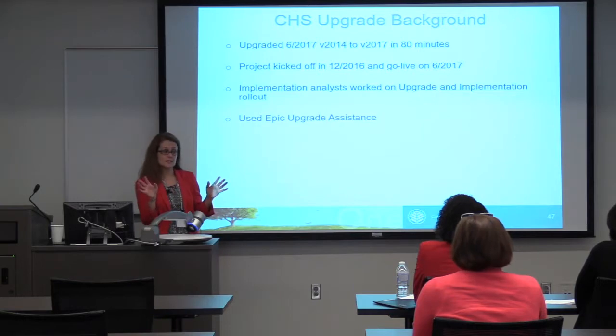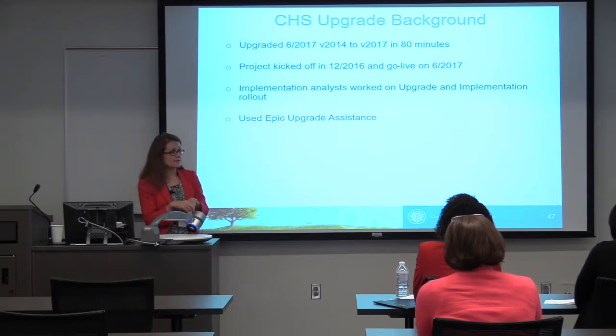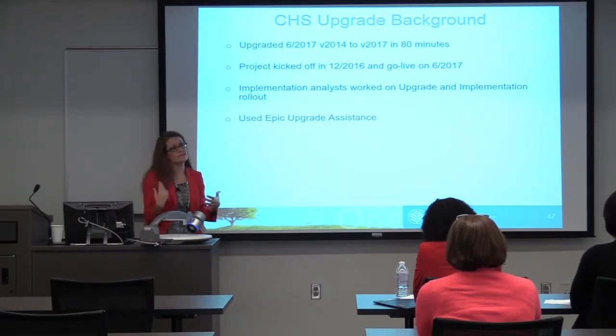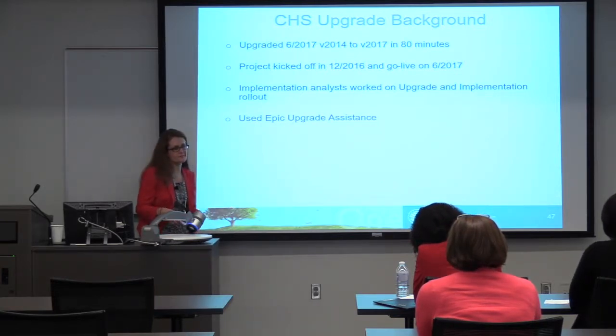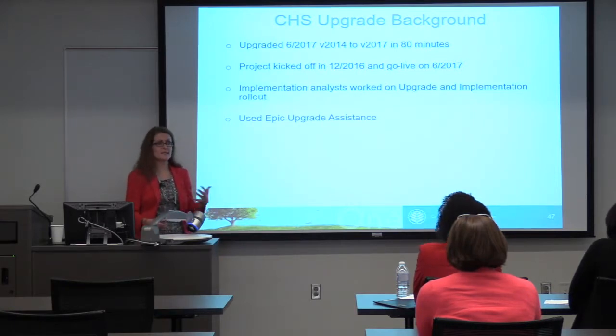We did not do any in-class upgrade training. It wasn't necessary. We did a lot of e-learnings and a lot of job aids. That was the best mechanism that we saw for the changes that we made. We didn't have a lot of net new functionality.